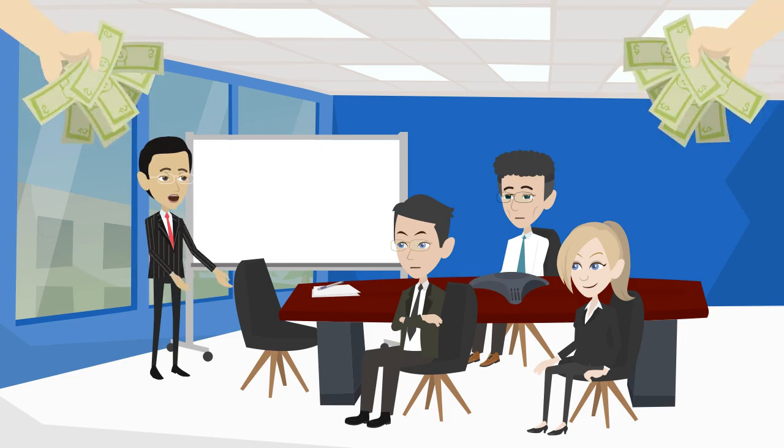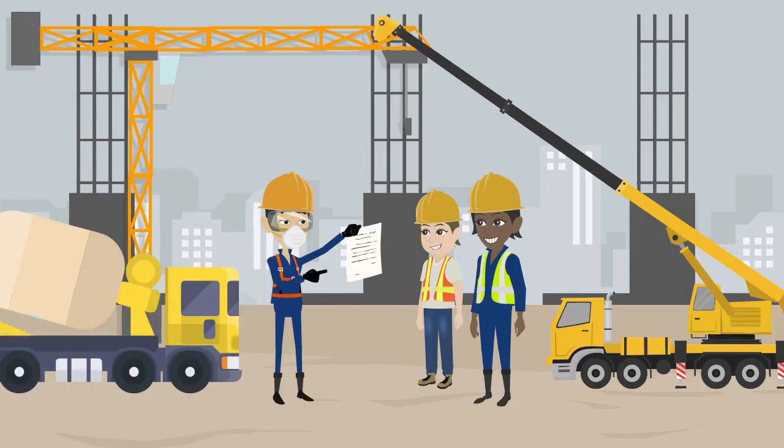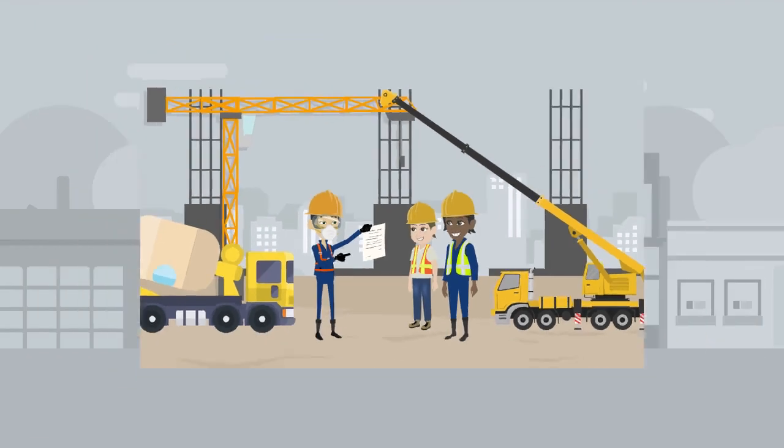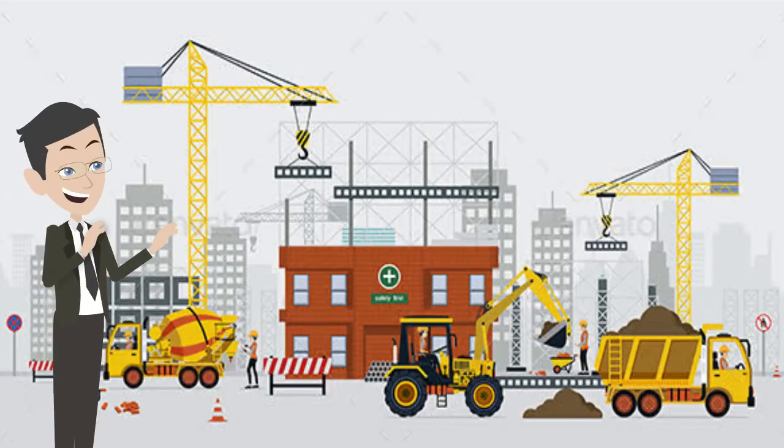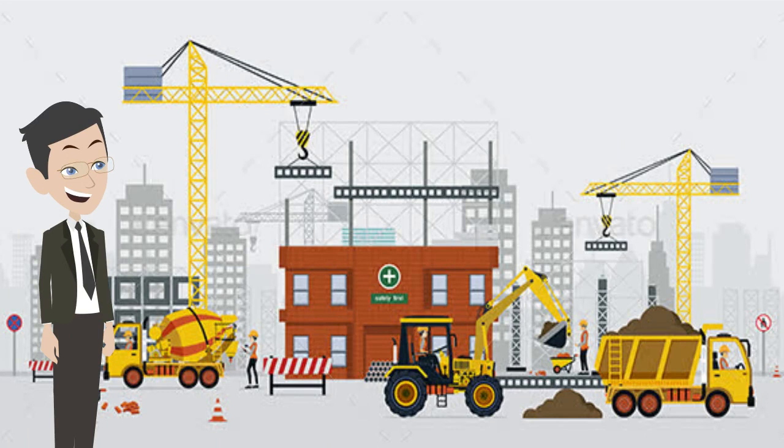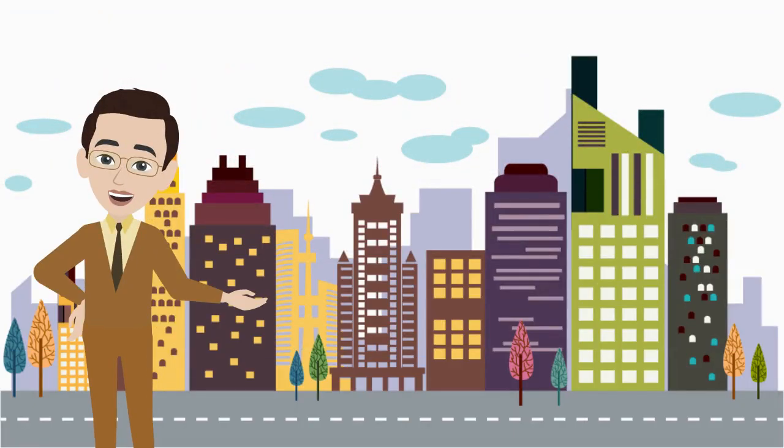The business unit must provide the funding for the total project, and only then will the CS manager issue the PO. CS will work with you and the construction team to prepare an execution plan and detailed construction schedule. Construction work usually starts about 30 days after the PO is issued. The exciting part is seeing physical work happening on the ground, turning your ideas into reality.